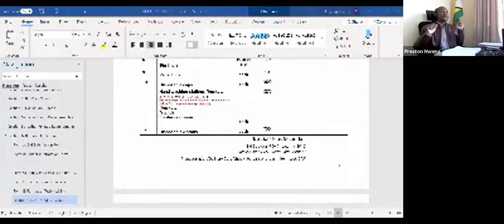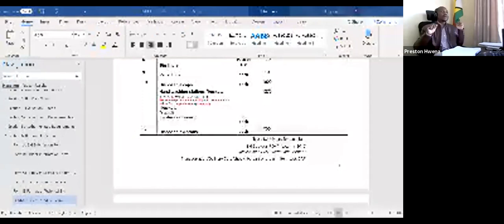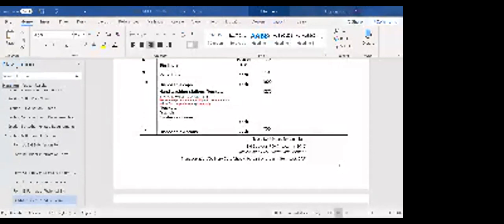But remember, the delivery is still your responsibility. If it's coming by road, you are still delivering at place, so you are still delivering to our place. But if it's coming by air, then it changes to CPT, which is carriage paid to the international airport. From there onwards, we take charge of the clearing and the internal transport. Okay. Yes. All right. Thank you very much. You are welcome.